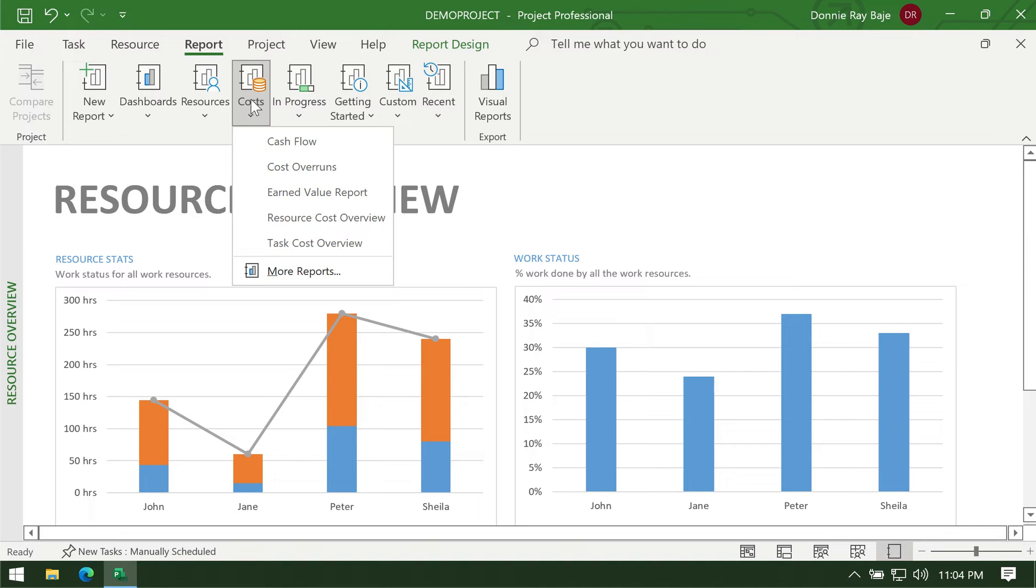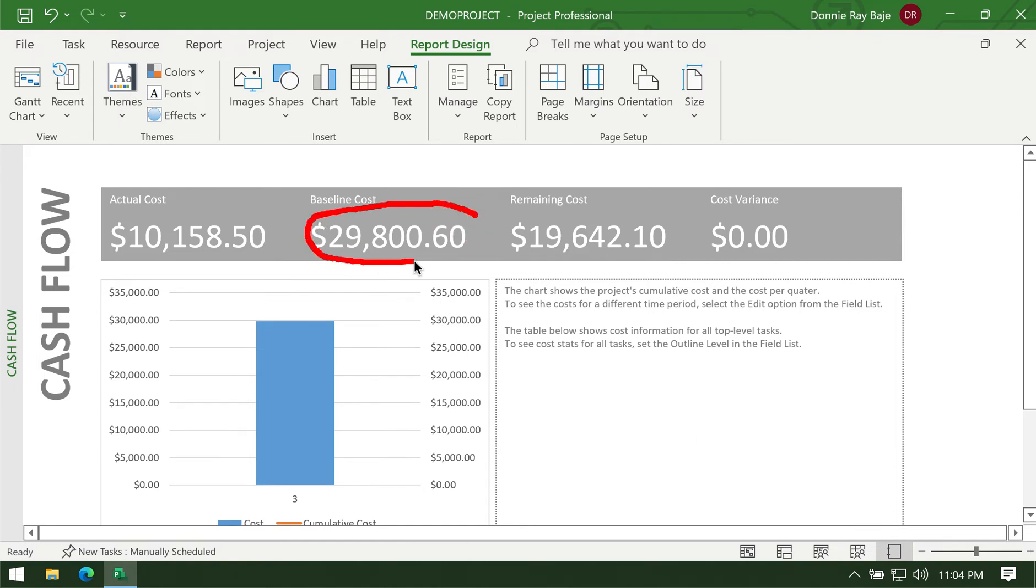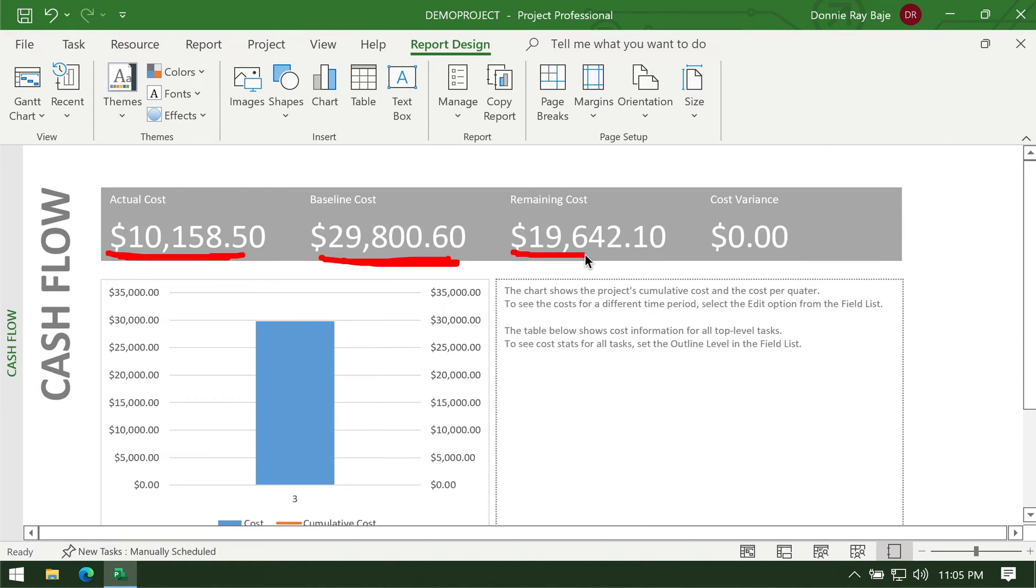Let's say that we have here cash flow, and you will notice that we have a very simple report here where we have the baseline cost. This was the plan that we had. If you remember in our previous video we set a baseline, so this is how much the project would cost and this is how much we have consumed out of that baseline.